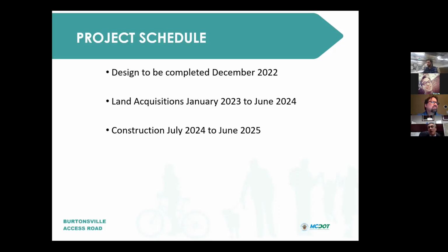And we're going to try to time it to do the construction for where the school connects during the summer month when the school is not in session, to accommodate them, and then finish up the rest of it at a later time. So that is the project schedule. Next.